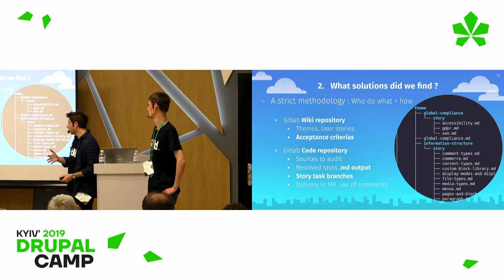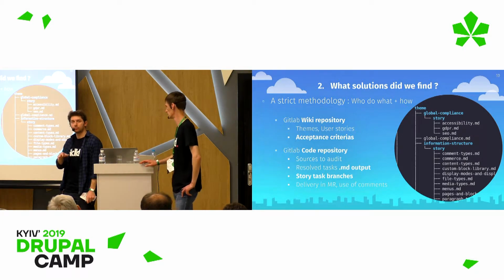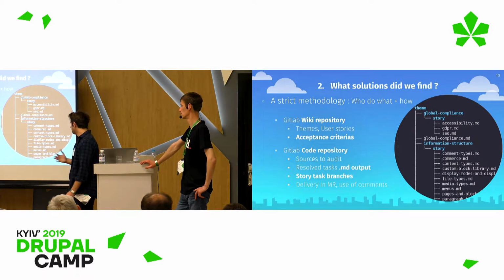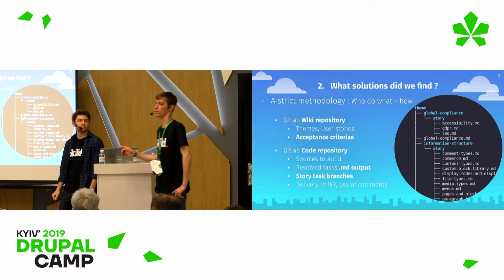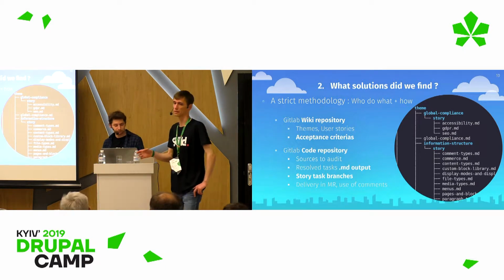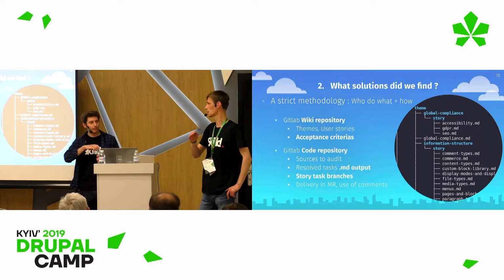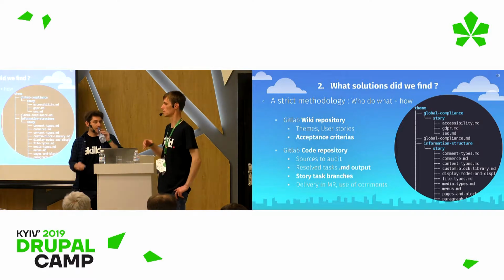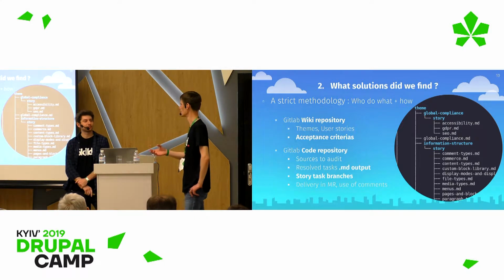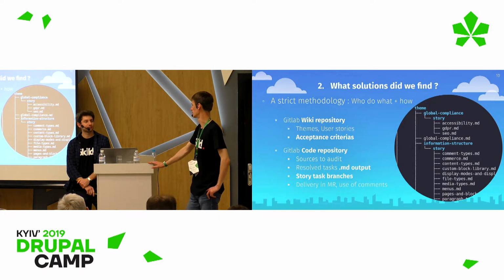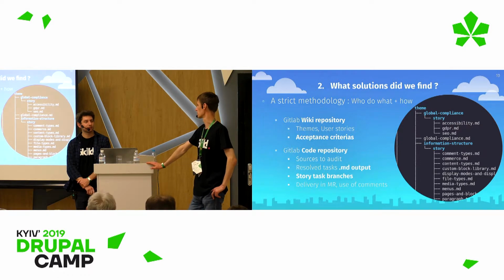So basically, the audits that we did this way had maybe 25 tasks. It means that if you split them properly, you can have 25 developers conducting the audit at the same time and have the audit done in like 3 hours. And even so, you can give these tasks to newbie developers, because if a newbie developer has totally clear acceptance criteria, he may just gain some new knowledge, making small audits of small tasks and grow as a developer. Yes, I know usually newbies don't do audits, but still with this structure, it's not a problem actually. Exactly.